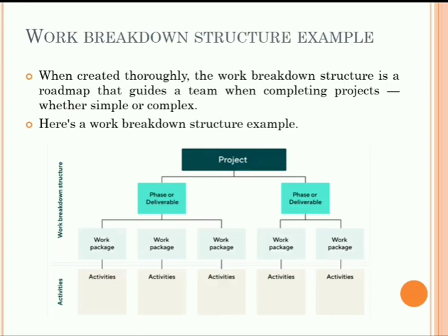In the phase based work breakdown structure, the final deliverable is displayed on top with the work breakdown structure level below, showing the five phases of the project: initiation, planning, execution, control and closeout. Just as in the deliverable based work breakdown structure, the project phases are divided into project deliverables and work packages.